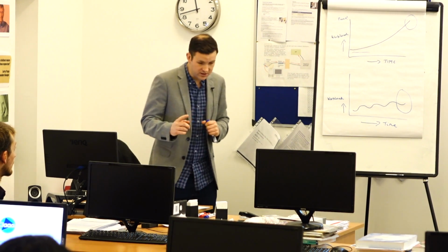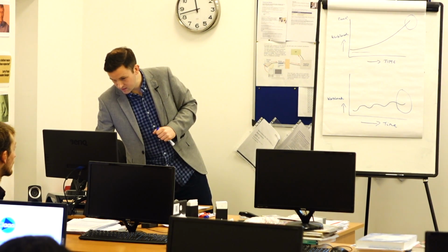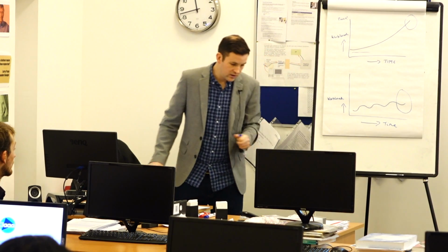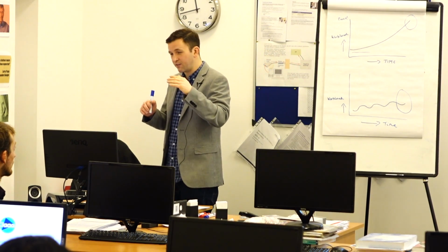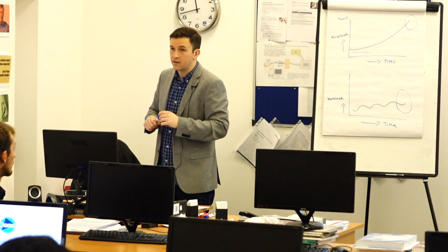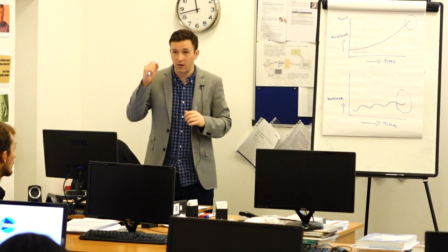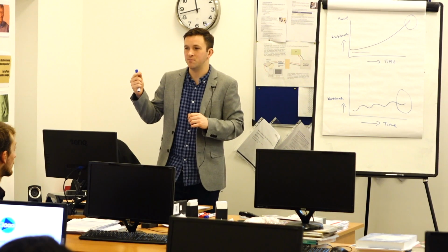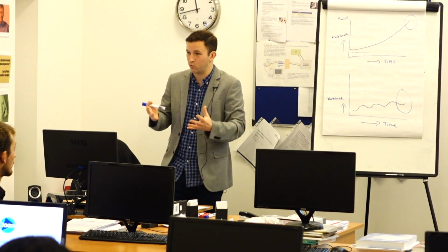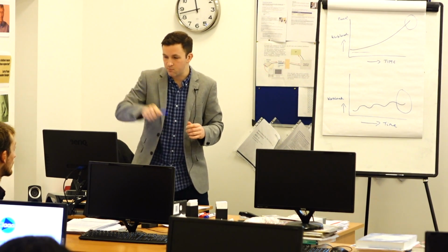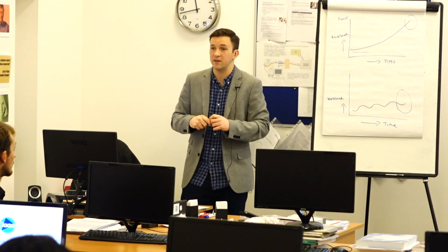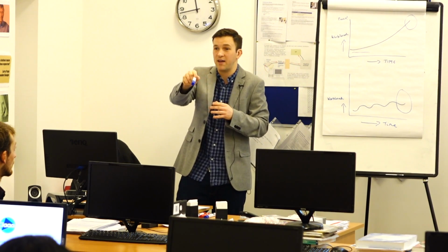And what you also do at this process is go back to this backlog, and if they feel they need something refactored, or they feel that they've now thought of another item having seen that item, or even they've now realized they don't need another bit because it's in the bit you've already developed, they can rechange this backlog. So this backlog is adaptable, and you revisit that every 2 weeks. And so that's the idea of changing your path as you're going along it.